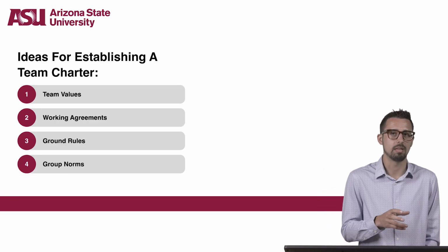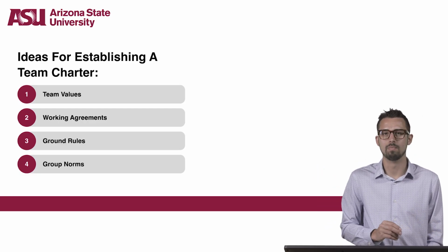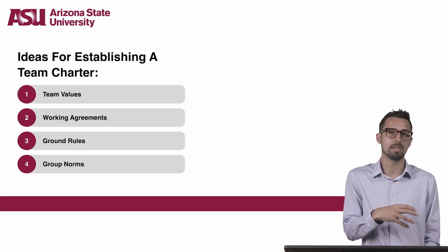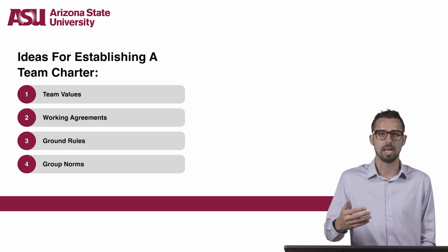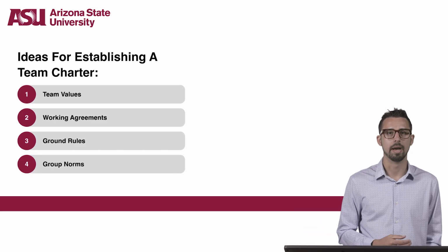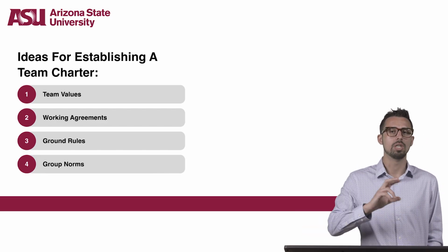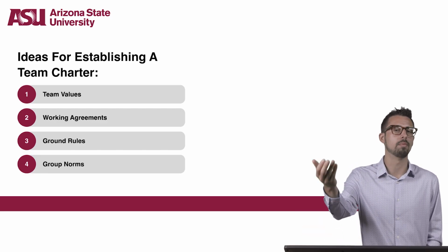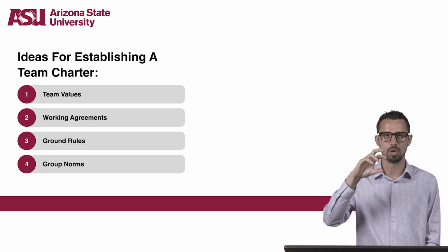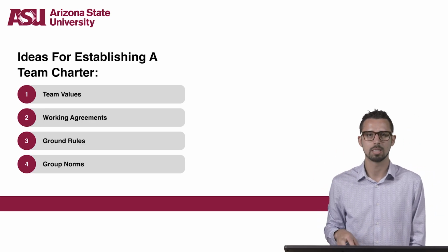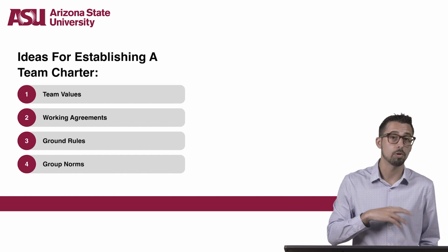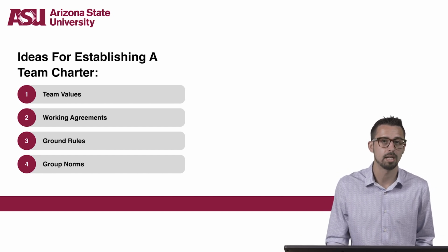can take in work, what done means so the team can judge completeness and consistency, respecting the time box, or the use of work in progress limits. All of those are great examples of working agreements. You might also set up some ground rules, such as one person talking in a meeting.